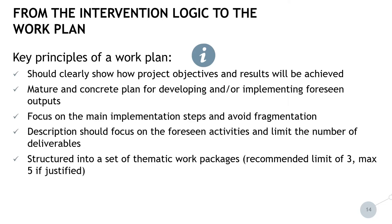The description should focus on foreseen activities and limit the number of single deliverables for each activity. Contrary to the former Interreg Central Europe program, there is now sufficient space in the project application form to describe the foreseen activities. In terms of overall structure, the work plan is structured into a set of thematic work packages — we recommend limiting it to three, though this can be increased to a maximum of five if justified by content and complexity of the project.